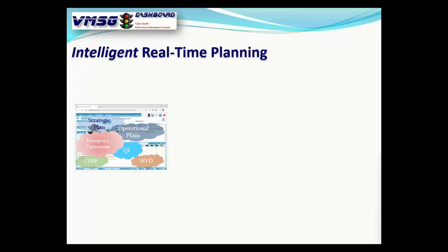So here's what happens on that fourth Friday at 1 o'clock in the morning. The system goes in and it'll look at every user in the account who's been assigned as an activity lead or an objective lead. In the pyramid, you assign people at the objective level and the activity level to basically manage those pieces of it. It's going to look at those and it's going to ask those three questions. Have you been in the last 30 days? Anything behind schedule?